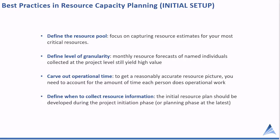This will save you a lot of time and can filter out a lot of noise. I've seen companies collect lots of resource data and then really not know what to do with it. Then you've got the need to define your level of granularity. Some people argue we need to go to the task level and assign people at the task level of our schedule. Very few companies can achieve that. We would recommend monthly utilization at the project level, which is going to give you a lot more insight than not having any resource data at all. Project level or phase level information is about as low a level as you need to go to get good enough data.